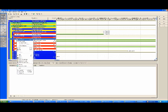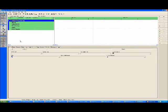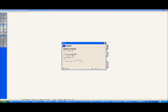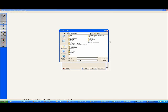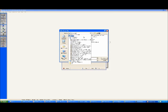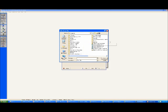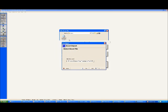So I'm going to open up this project, and this is just a template that's got the WBS elements in it: milling, adjustments, resurfacing, video, point repairs. There are no activities in here yet. I'm going to do File, Import, and the import format I'm going to pick is Spreadsheet. I'll go to Next, select the file to import. I'm going to drill in the folder system to the folder that we're using for today's presentation. It's under Projects Miscellaneous, Primavera, Tobacco Road Presentation, Part 2. And there's the spreadsheet right there.